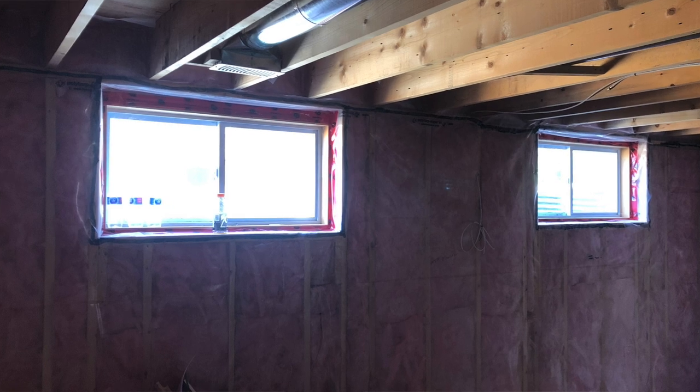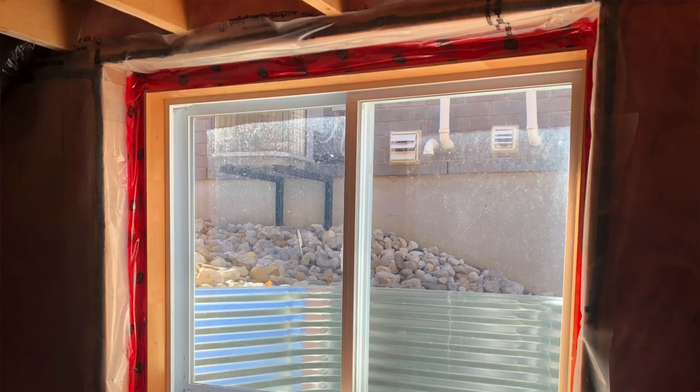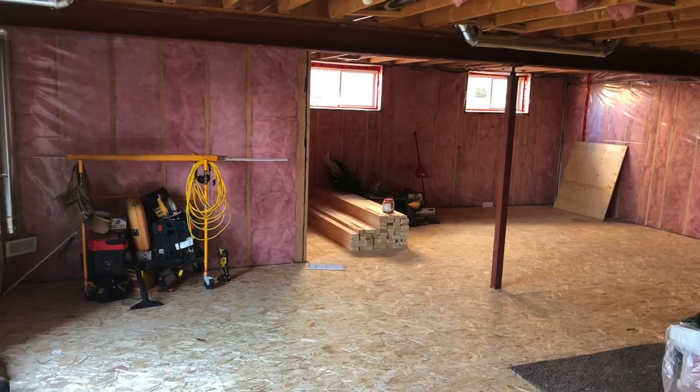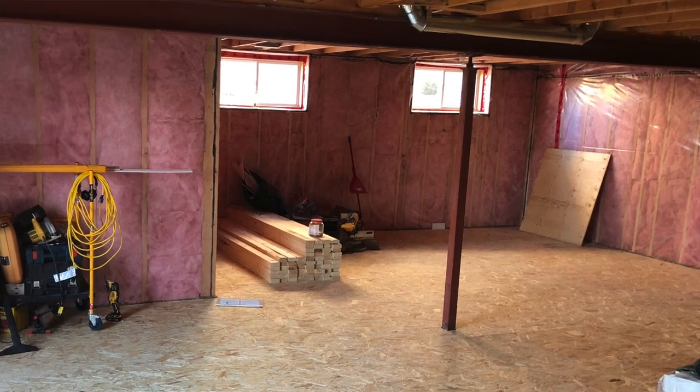Windows. A lot of basement windows from a certain era, especially recently, do not have window returns. You know, the little piece of wood that comes out that you attach your trim to. So you have to fabricate the window returns and then trim around it. Are you going to be adding a window? How much materials am I going to need for building out the windows? That's another thing. Posts, structural posts. Typically, you're not going to move those because that's a lot of money. How are you going to cap them? Are we drywalling them? Are we capping them in trim? What's that plan?